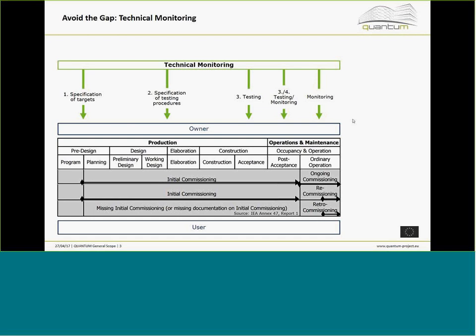After testing you may go into continuous monitoring or supervision of the actual performance of the building. A key quality management principle we derive from this is that technical monitoring should be a third-party job. In the early phase, people may be reluctant to provide target values, so you need an independent party that insists on getting specific, testable targets. And later when achieving qualities and target values is discussed, a third party is always helpful.